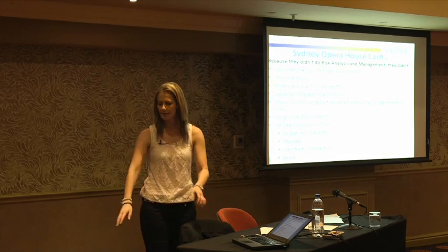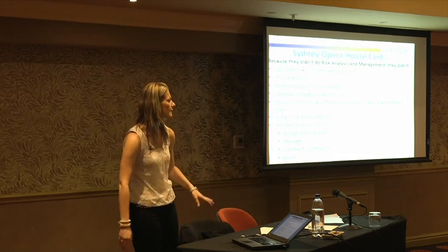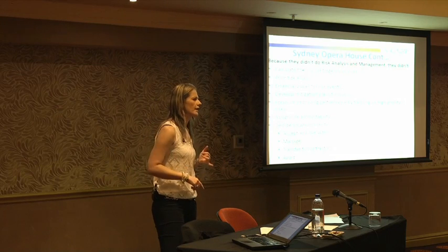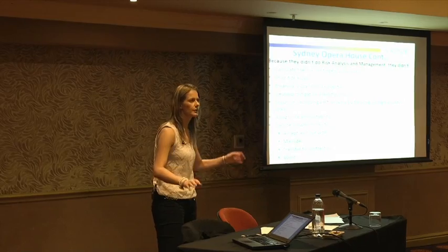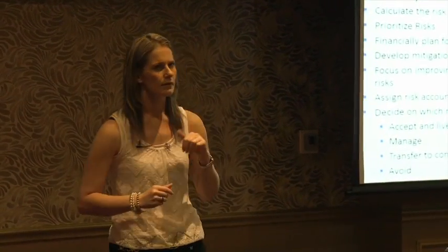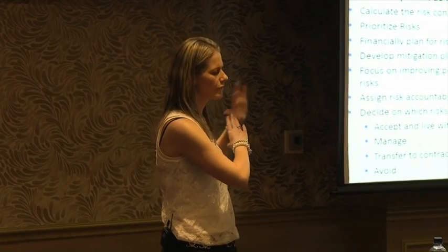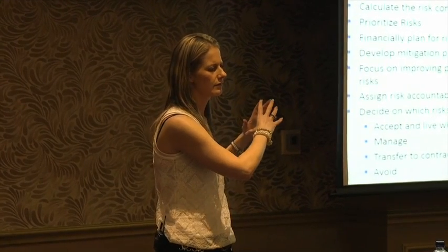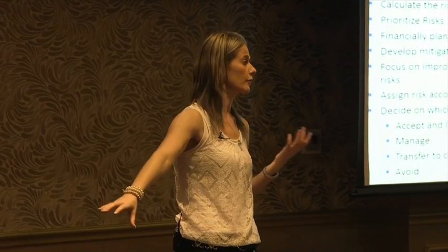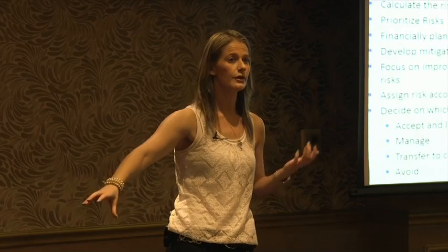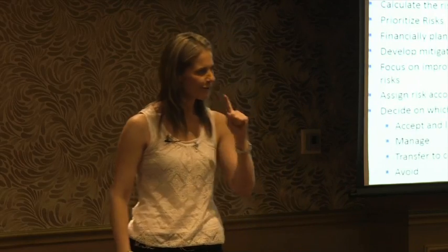I say, okay, and then down at number 10, there might be a risk like, we don't know if we have enough budget to finish this project, or the engineering is only 20% model review. And then I'm saying, why do we think that rain or wind or any of that poses a bigger threat to cost and schedule than not even knowing if we have enough budget or how the whole engineering design is going to look? So very important.